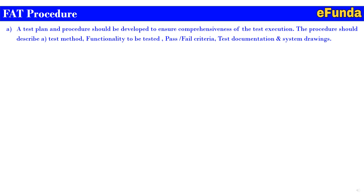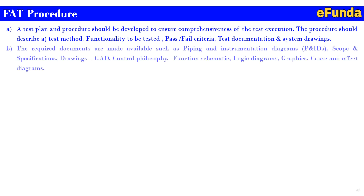A test plan and procedure should be developed to ensure comprehensiveness of the test execution. The procedure should describe the test method, functionality to be tested, pass-fail criteria, test documentation and system drawings. The required documents made available include piping and instrumentation diagram (P&ID), scope and specification drawings (mainly GADs), control philosophy, functional schematics, logic diagrams, graphics, cause and effect diagrams, as well as inspection and test plan, checklist and procedure specific to the FAT, and calibrations and certifications required by the contract.